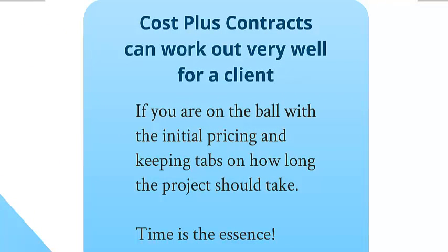Cost-plus contracts can work for you. They can work very well, but you have to make sure that you have the final say on who gets the job, along with the right to ask for more quotes for the work. Cost-plus contracts work very well for a client, but you have to have your wits about yourself, and you need to be the driver when it comes to pricing. You need to push for fixed price quotes, and you need to understand what is included in each one. This way, you're always comparing apples with apples.